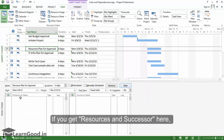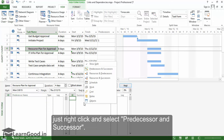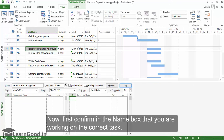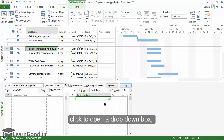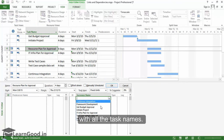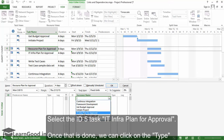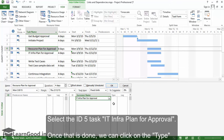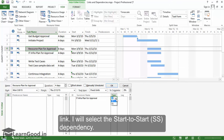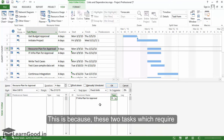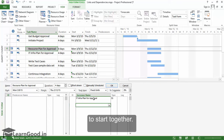If you see Resources and Successor here, just right-click and select Predecessor and Successor. Now, first confirm in the Name box that you are working on the correct task. Then, in the Successor Name column, click to open a drop-down box with all the task names. Select the ID 5 task, IT Infra Plan for Approval. Once that is done, we can click on the Type column to select the type of dependency link. I will select the Start to Start dependency, because these two tasks, which require getting approvals from two different departments, can start together.